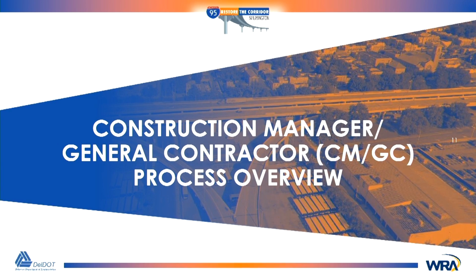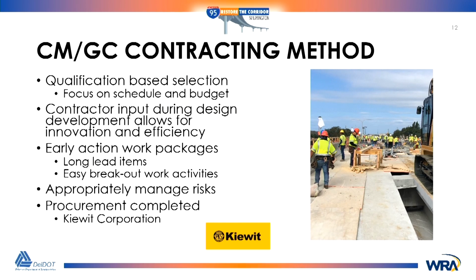I'll cover this real quick. Basically, it was CMGC, which worked out great with this one. It allows you to sit down with the designer and the contractor, work together on the design, see how they want to build it, and tailor the design to that, as well as come up with innovative ideas to cut costs and cut down on schedule times. This project, I believe, was originally 7 phases, and in the end, it ended up being 3 main phases.